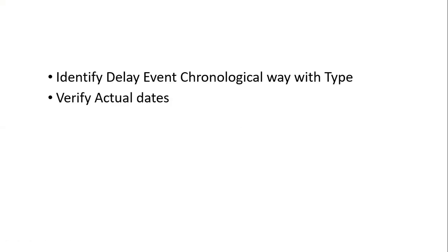Verify actual dates. You have to be very sure about the dates when the rainy season started which caused delay to your project completion date, when there was political strike and your material supply was cut off. Those dates should be mentioned in a very accurate way. It is not acceptable that you use some thoughts like it can be 30th of April but actually it was 18th of April. That will weaken your case.